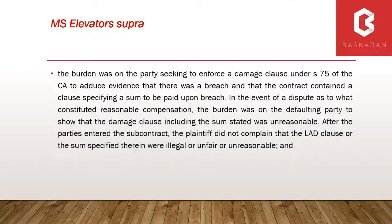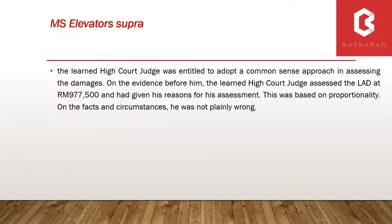Some guidance was also given on what a plaintiff challenging on the basis of unreasonableness would need to do. The Court of Appeal was quite moved by the fact that at no point after the subcontract was entered into did the plaintiffs allege that the sum in the LAD clause was illegal, unfair, or unreasonable. The High Court had reduced the LAD sum, but this was more to account for delay for which the main contractor was responsible. A portion of the liquidated damages was however recovered by the main contractor from the subcontractor in MS Elevators.